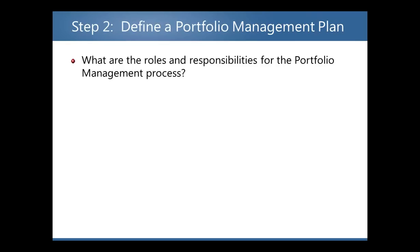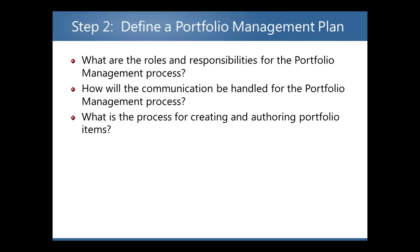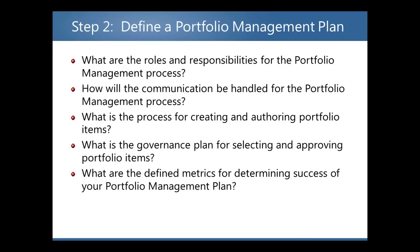It's very important to make sure you've identified all the stakeholders. Go through those questions in detail and make sure that everybody involved in the answers is included in the portfolio management process. Now that you know what stakeholders to involve, let's move on to step two: define a portfolio management plan. Very similar to the project management plan that we're all familiar with — not a schedule, but the actual plan itself. The following questions need to be addressed: What are the roles and responsibilities of the stakeholders? How will communication be handled throughout the process? What is the process for creating portfolio items? How will portfolio items be selected and approved? And what metrics will be used to determine success?